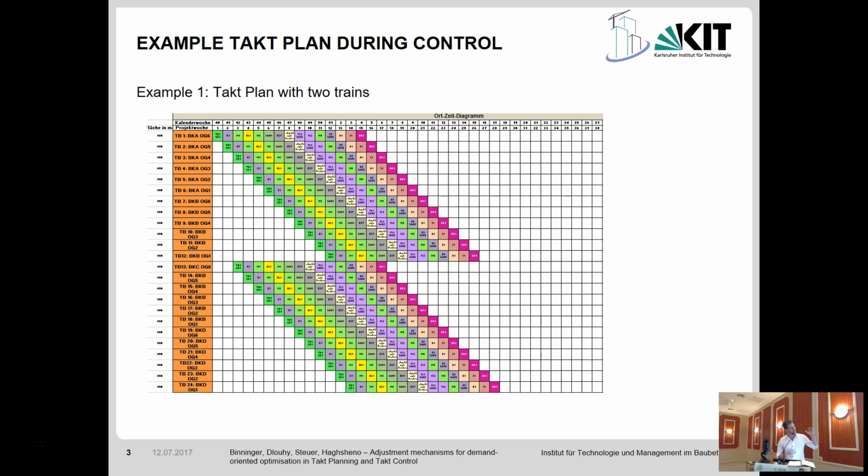So if you look at the client's perspective in the horizontal line, you can see easily a kind of flow, and you also see from the client's perspective what the status of my flat is and what the duration is. And you also have the diagonal flow. This is the trade perspective. So we just said to the trade, look, you're the purple color. So look at your flow and make sure that this flow is continuous.